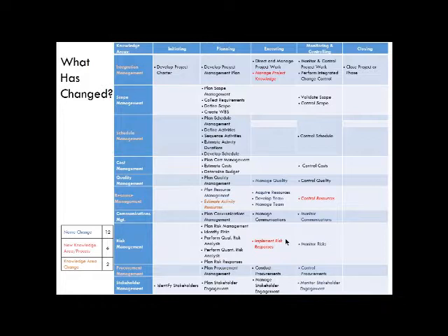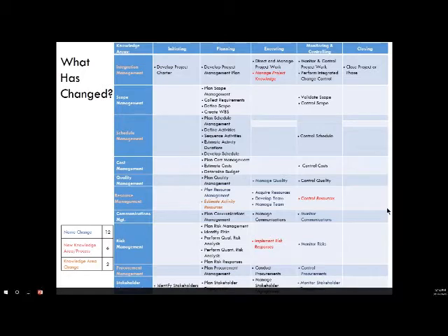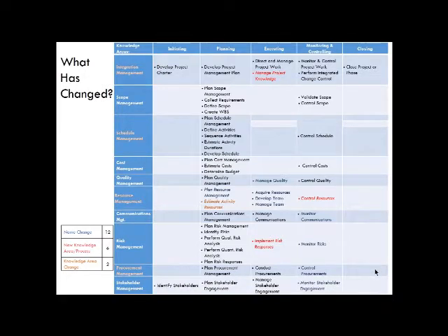Make sure you understand the difference still between process groups and life cycle phases. We may, as a result of the risk analysis, actually have risk responses that we want to implement at various points in our project life cycle. And it's an execution process. It's a doing process. You may also notice that in procurement management, the process close procurements has disappeared. So close procurements is now part of control procurements. It's an output of control procurements, closed contracts.